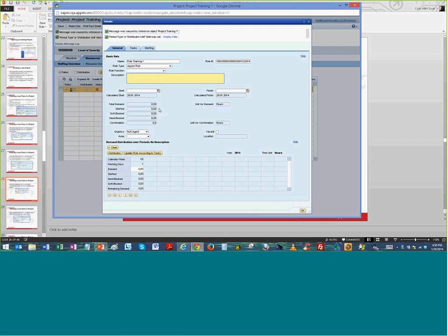Again, start and finish date. So what we can do is say that this role has a very specific timeline. Here's when we need people by. Here's when we anticipate the program's going to finish, so we want this role to finish on such and such day. We've only got budget for this role. We have a consultant, we've only got budget for 3 months, so that's what goes in here and triggers that.